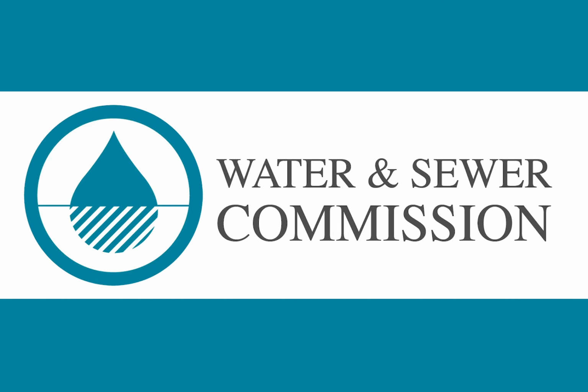So we contacted the conservation agent to discuss that work, and it was approved. It was not a requirement. Permanent work obviously is. So those 2 new wells will be permanent and will need to go through conservation. And there will be a pumping test for those for full flow with Mass DEP as well. That's the next step. So all good news for basically what we conducted last week.